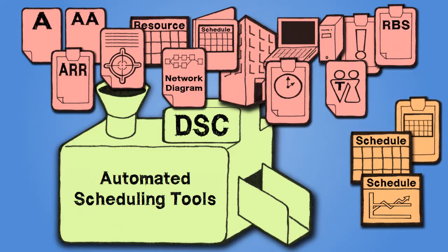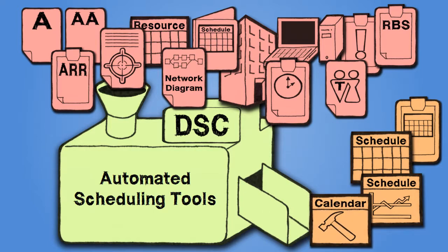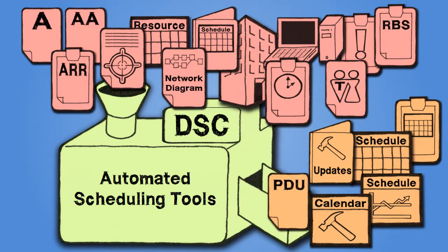Schedule data is all the information that was compiled and used for describing and controlling the develop schedule process. Project calendars show the working days, shifts, or periods that are available for the work that needs to be completed. Project management plan updates are any and all updates that need to be annotated back into the project management plan. Project document updates to the activity resource requirements, activity attributes, calendars, and the risk register are necessary outputs from the develop schedule process.